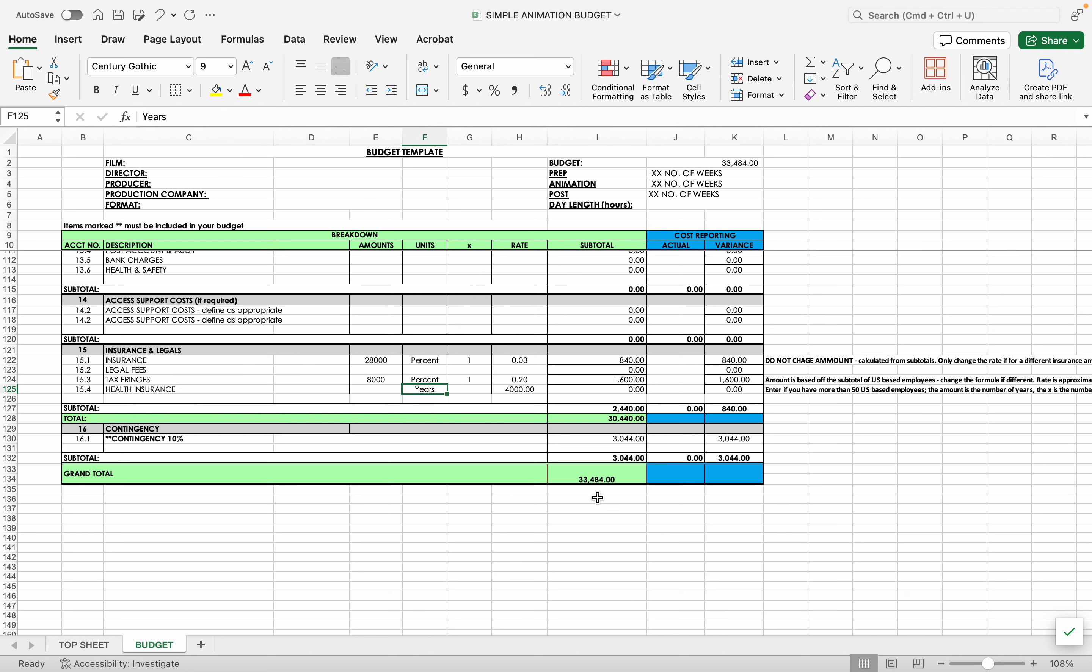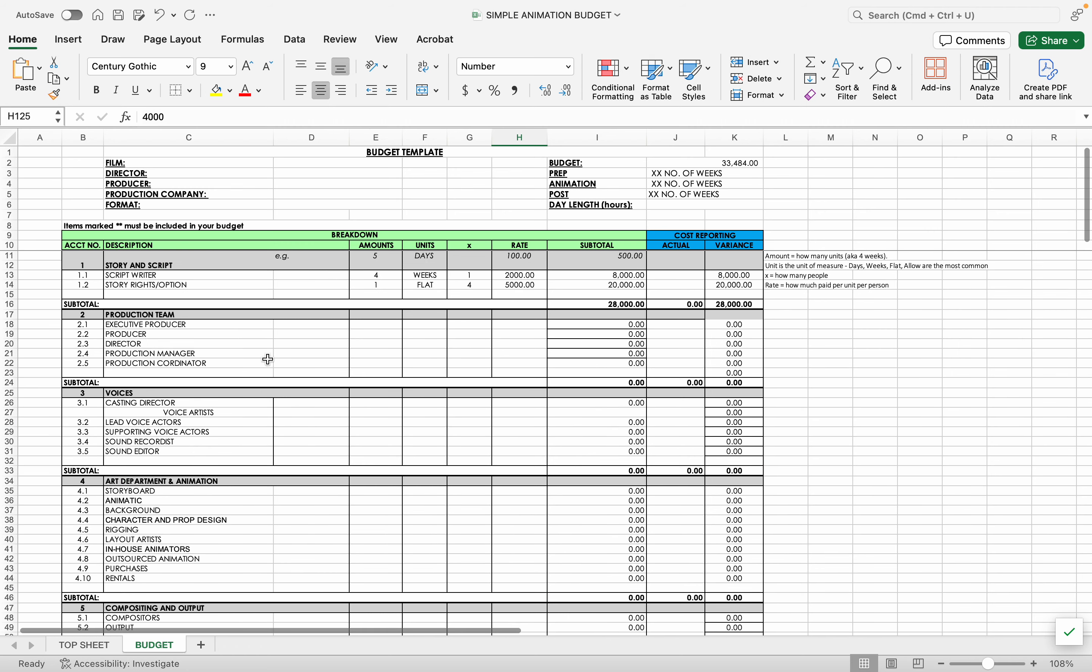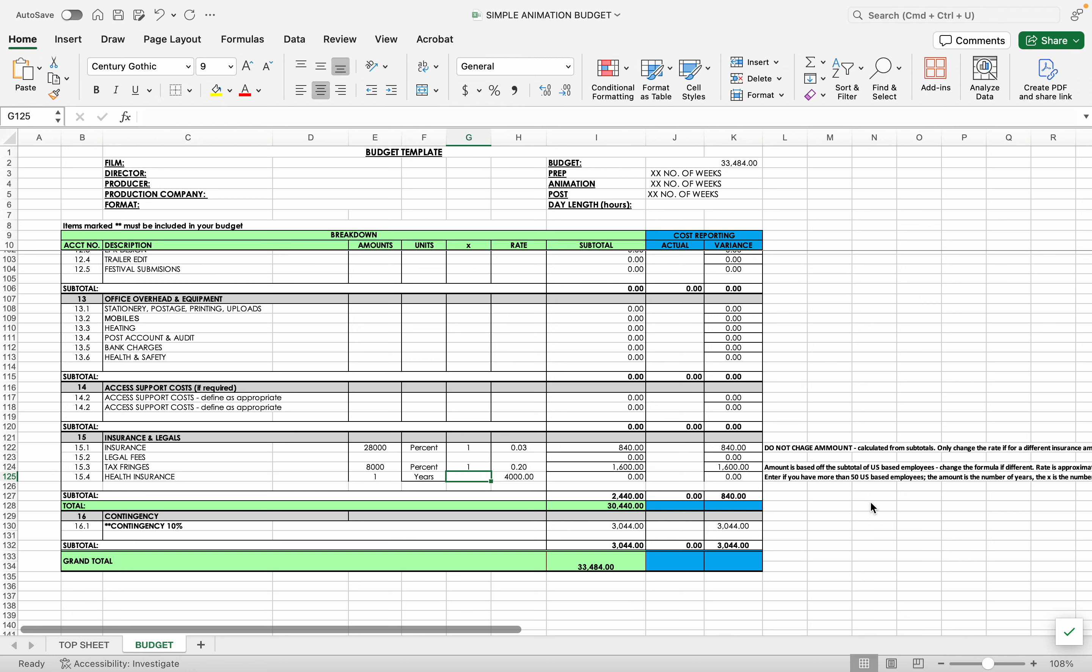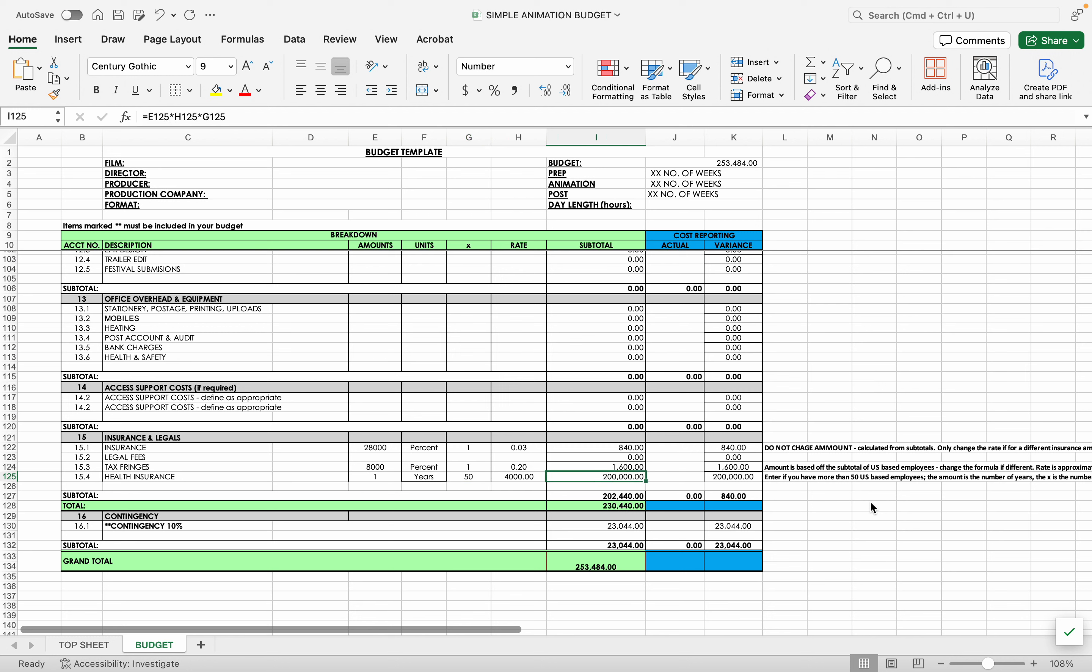Health insurance, it looks like on average for companies in the United States paying health insurance, it's $4,000 per year. It's a lot more if the people have family, a lot less if they don't. It varies based on their age, all that stuff. I'm putting in $4,000 as a base number. And if you end up in this sheet with more than 50 U.S.-based employees, you're going to want to include health insurance. If you're significantly under 50, you could not. You can always provide health insurance even if it's not legally required. But if you have 50 or more, you're going to need to provide it. So what we're going to say is the number of years. Let's say this is a one-year production and we have 50 people. So you see for 50 people for one year, our contribution for their health insurance is $200,000.